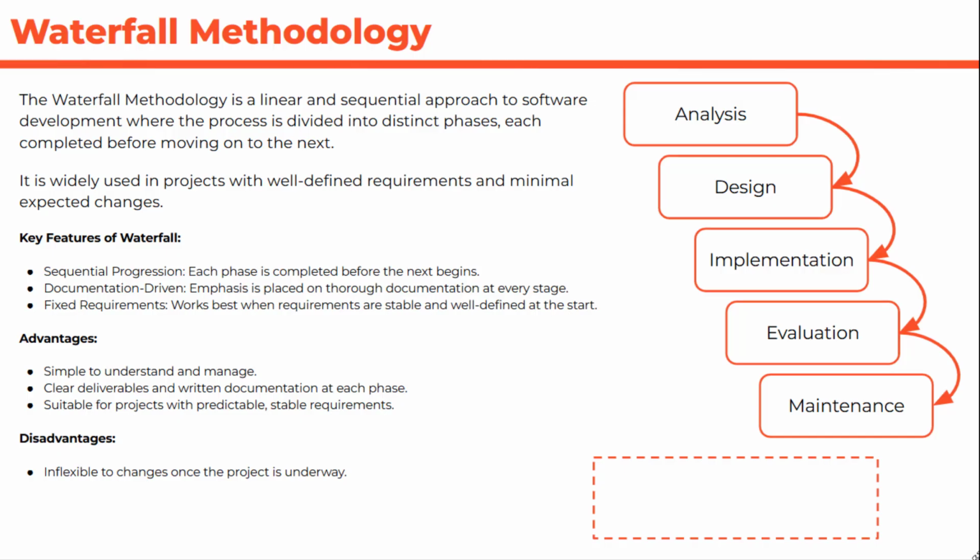So that's why in government lots of these fail, because the world is changing all the time and we can't always adapt as needed to the real world environment. So by the time the software gets produced, it's often out of date, which is a problem. Also, not much user involvement after the analysis stage, so it definitely lacks feedback at each stage.